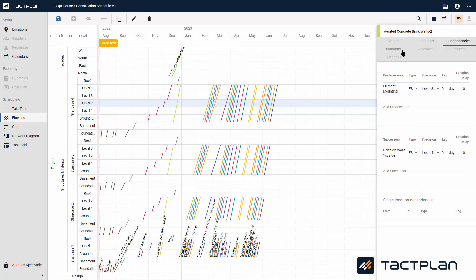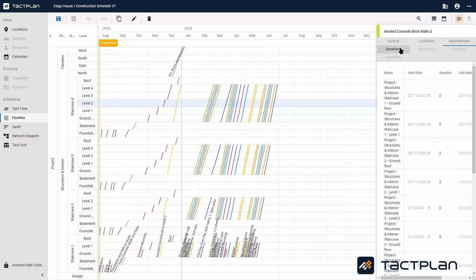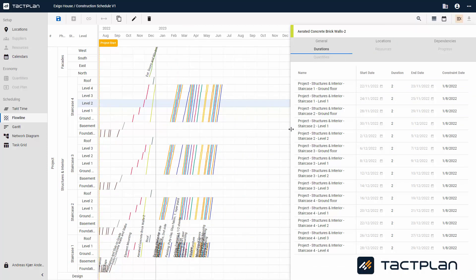If you click on Duration, you can see how long the durations are for each task per location. You can look at start and end date, duration, and also constraint date.